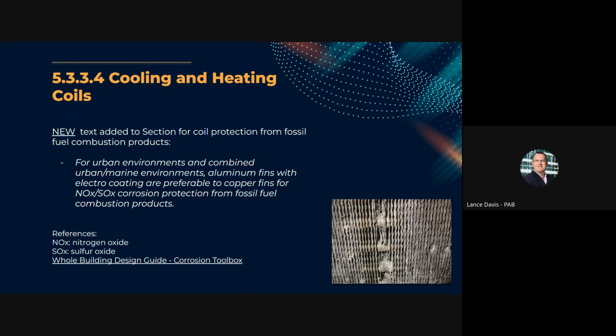And then you can use that same document to hit the street with, to advertise for design services, so that your design teams know what they're designing to with all those tiers as well. So it's a very useful document to sort of keep track of the tiers throughout the whole process of the project. So make sure you check that out.